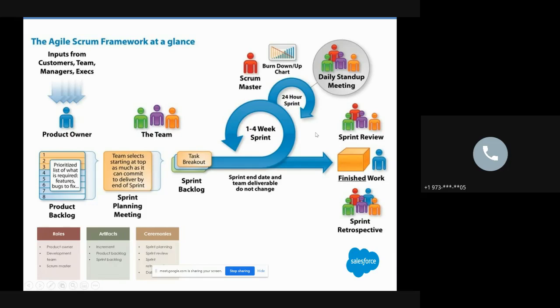And obviously, whatever is being worked on and changes, we recommend heavily that we make a note in whatever tool we are using, Jira or any other agile tool, so that the data would reflect for other team members to see what's happening. So after 2 weeks, right, the sprint review. Sprint review is really for the 2 week cycle, right? So it's essentially a demo of what work is done, basically.